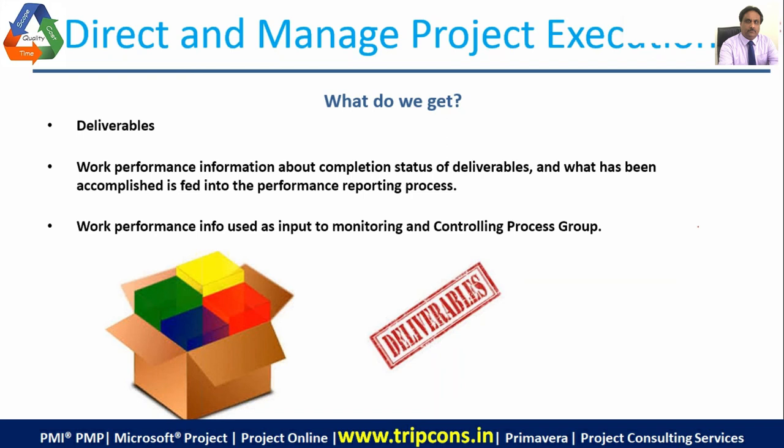So when you are directing and managing the project execution, make sure that you know your deliverables, make sure that you know the actual time, actual cost, and actual work effort, and you are comparing them with the planned values so that you can control it. If you don't control it, then what will happen? The project will be having time overrun, cost overrun. So that will be a problem.